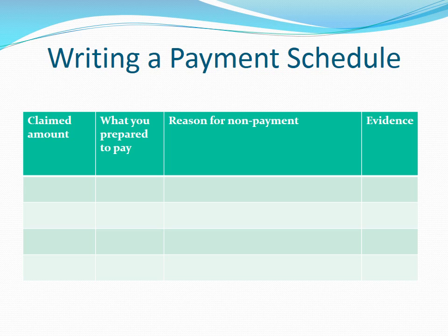Issues of damages, defects, and offset have already been dealt with and are not reasons for not paying. Instead, they go to your right to reduce the amount you are liable to pay. In other words, you are liable to pay the claimed amount for work done as requested by the builder, but are entitled to a credit to reduce the amount because of things owed to you by the claimant. But as said, this right to reduce must be within the contract.